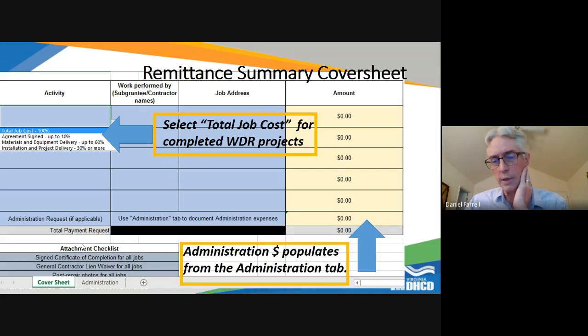If you know that the HVAC equipment is going to be delayed and you know that going in, it seems reasonable to me that we could set it up as maybe a 2-tranche project.